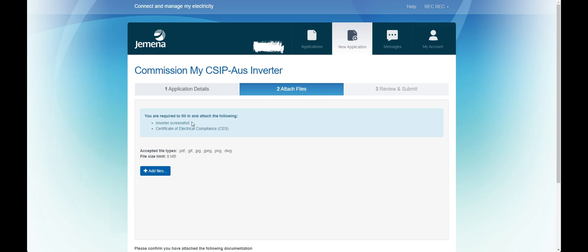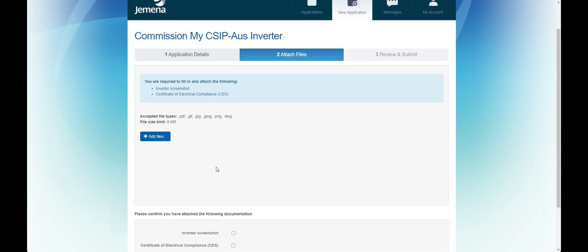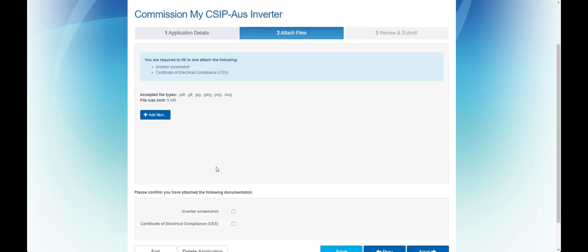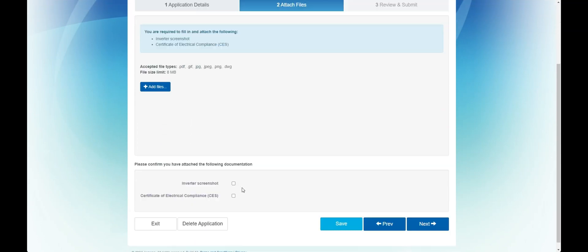These attachments include the certificate of electrical safety and screenshots of the inverter settings from the OEM app. We have included a few check boxes to help installers remember their requirements.